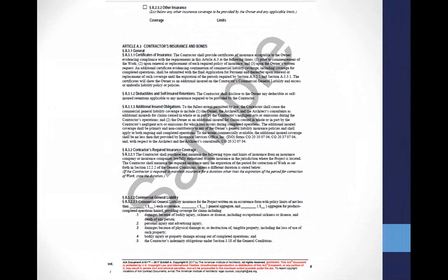And those often get negotiated even broader, such that the indemnity is not limited to bodily injury or property damage. That's something that we seek to limit. The standard AIA language limits it to that, but if you look at the revisions common in every owner contract that I see, it's broad form indemnity. It's words like arising out of your work. Well, arising out of your work can be cybersecurity. Arising out of your work can be all of those boxes like business interruption.